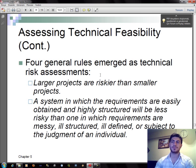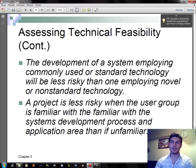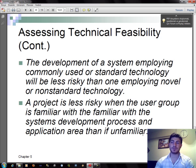Four general rules have emerged for technical risk assessment: First, larger projects are riskier than smaller projects. Second, a system in which the requirements are easily obtained and highly structured will be less risky than one in which requirements are messy, ill-structured, ill-defined, or subject to the judgment of an individual. Third, the development of a system employing commonly used or standard technology will be less risky than one employing novel or non-standard technology. Fourth, a project is less risky when the user group is familiar with the systems development process and application area.